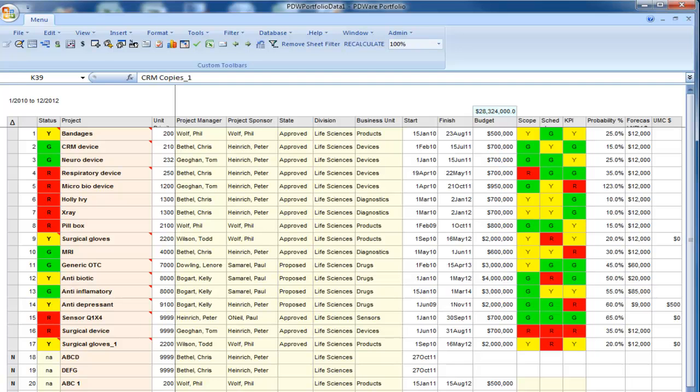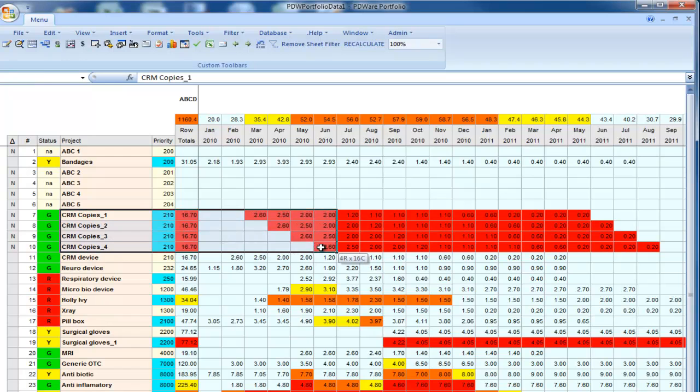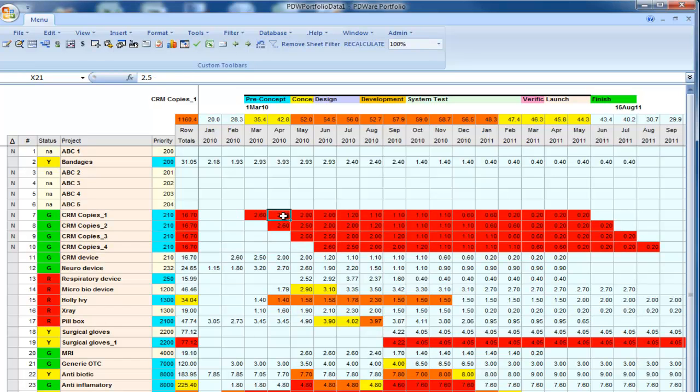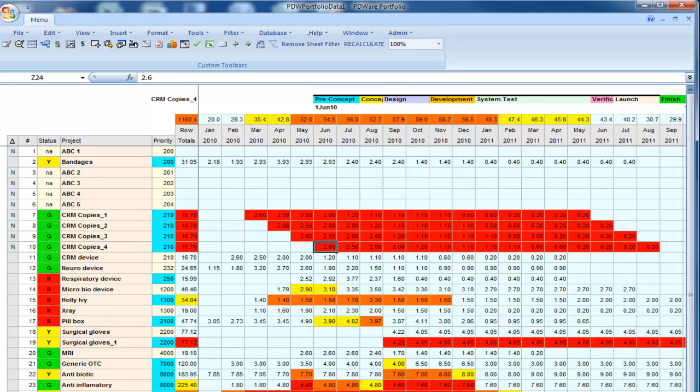And if I look at the demand, I can see on my CRM copies that the demand has been displaced by one month as each copy is made. And the dates for these projects, when I select them, notice the Gantt bar at the top of the screen is moving over by one month.